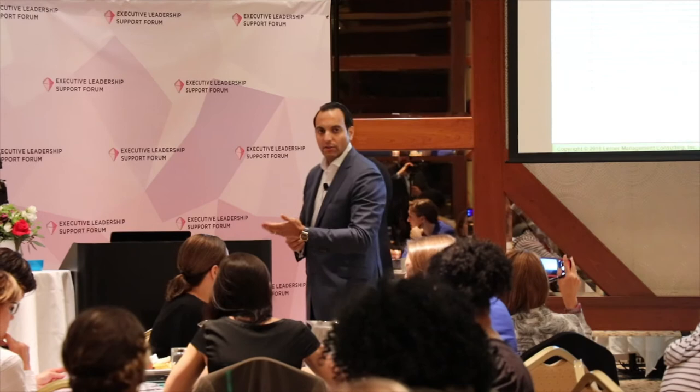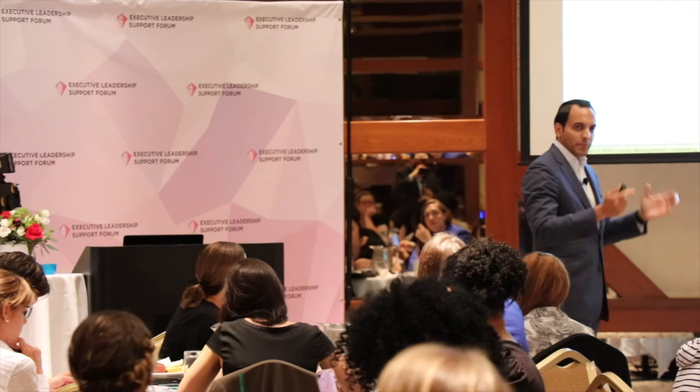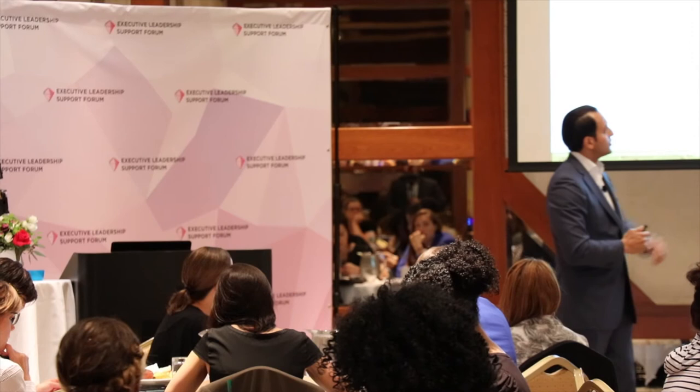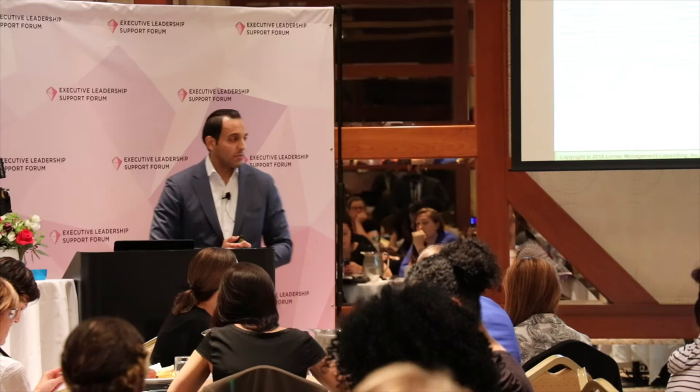If this is a construction project, you can't put the second coat of paint on until the first coat of paint dries. Responsibility organization, if it's just something within your organization, you could probably leave that blank. And then what's most important is you want to assign the responsible resource. This is where accountability comes into play. All right, so that's what your schedule would look like left to right.